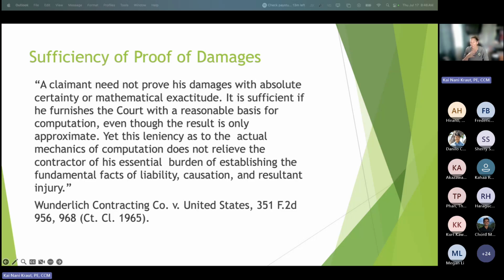But because you proceeded and I didn't know it was going to cost this much, or in some cases, I think even with the concrete, granted, I'm not as involved day to day, but this concrete thing they're claiming, I didn't know it was extra money until you flopped this packet on my desk a year after the work. Like how I could have said, don't do it, cut the channel. Like don't line it. I don't know if I could have done that, but you eliminated my ability to mitigate it because you didn't tell me that it was going to cost this. So does that require me to pay you now? It's not fair. I mean, so it goes back to the fairness.